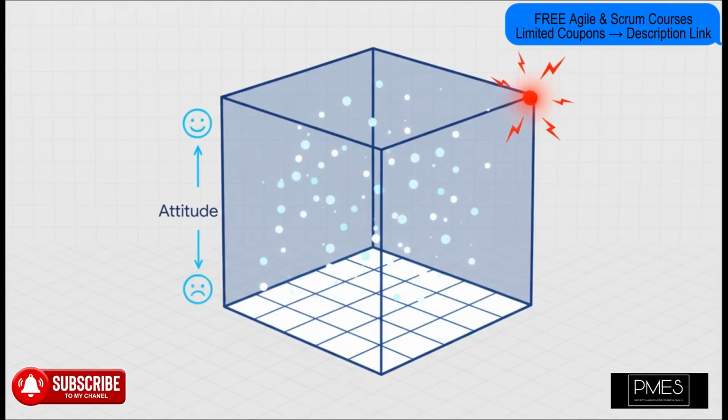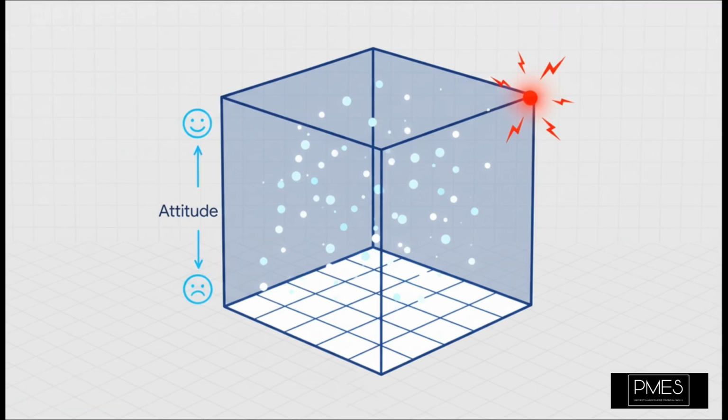So, the Stakeholder Cube literally takes that flat grid and pops it up into a third dimension. And what's that third dimension? Attitude. Now, just think about that for a second. Someone with high power and high interest is a key player, we know that. But if their attitude is negative, they're not just a key player anymore, they're a potential saboteur. A flat grid might not show you that critical difference. The cube, though, makes that risk flash like a giant red warning light on your dashboard, telling you exactly who you need to focus on to neutralize that threat.